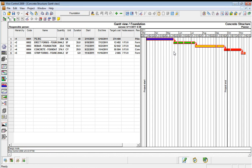So what we're interested in doing is really finding what the quantities by location, where we're really going to pile. We're not going to do all of the piles over the whole site at the same time. We're actually going to carry out in zones, and we're then going to form the foundations.